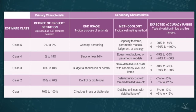Historically, estimates created by architects or engineers are usually low compared to the market because they've either excluded something in the means or methods that were identified by the contractor — for example, job office overhead types of items. This cost estimate classification matrix helps to explain why one might estimate a project on the low end based on knowledge of the project itself.